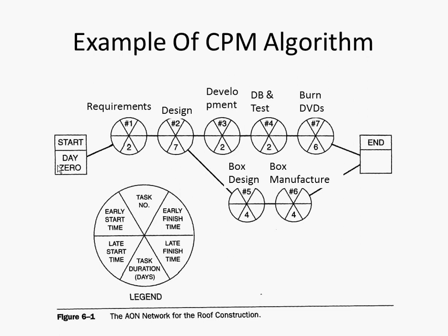What's the latest time this guy could finish? The upper guy, the upper right. 19. He has no leeway. We don't have slack here. The earliest he could finish is the same as the latest he could finish. We've got to keep on the ball with this one.